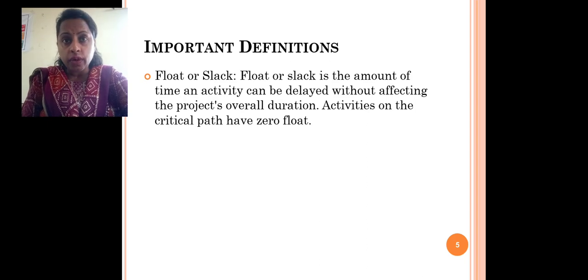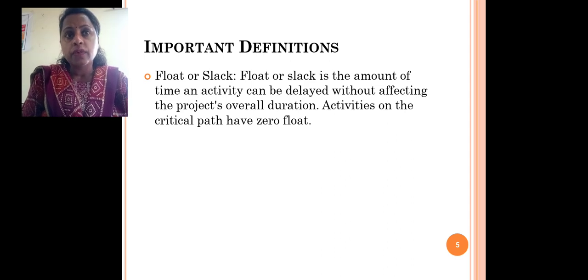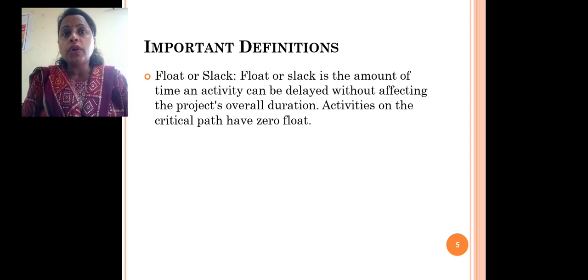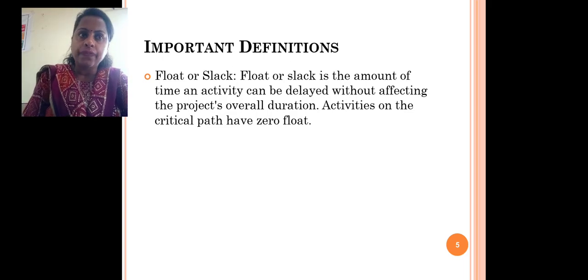Now, what are the floats or what are the slacks? Float or slack is the amount of time an activity can be delayed without affecting the project's overall duration. Activities on the critical path have zero floats.